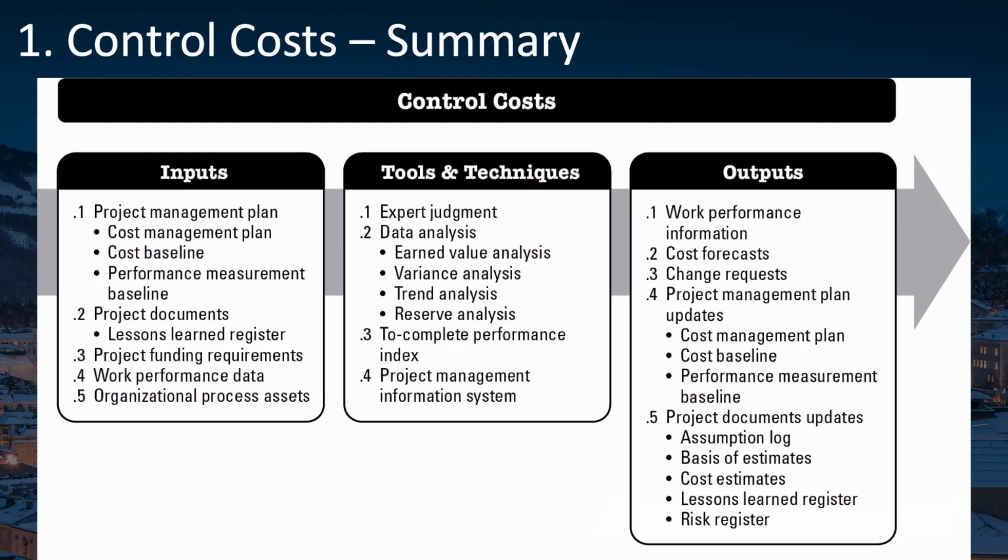Inputs are primarily your baselines and your actuals from your work performance data. You'll also have as inputs the rules from your cost management plan and lessons learned from your lessons learned register. And your time-phased project funding requirements.